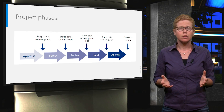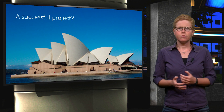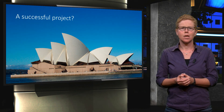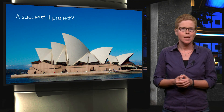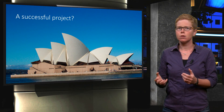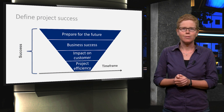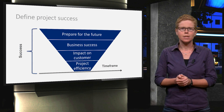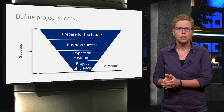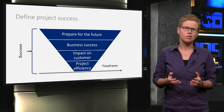But to review a project, we need to know something about project success. What seems successful for one can be perceived very unsuccessful by others. Take the famous example of the Sydney Opera House. It is claimed a failure in terms of project management, and at the same time a huge long-term business success. To define project success, we should realize that it contains various dimensions. The traditional way of looking at success is by time, cost and quality. This is what in the literature is called the iron triangle. Basically, this is project efficiency.